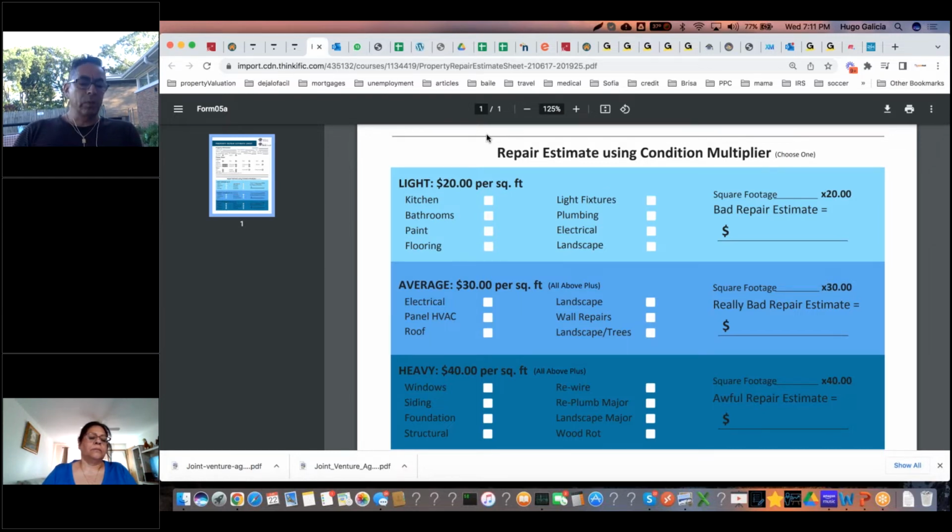But to prevent these, we give them a small project and test them out, right? If they deliver on time, quality, and price. So those are the three things that we look at: time frame, quality, and price. So again, we have a list of contractors that we've been using that are on ChicagoDealVault as preferred partners.